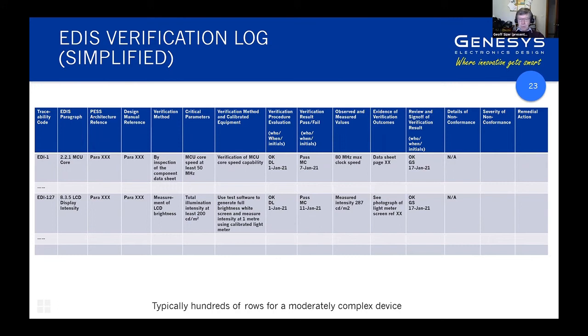So it's actually a virtuous cycle, not a vicious cycle, but it does give rise to additional work. I would say, as a rough guess, a third of your verification activities probably relate to 14971 requirements or derived requirements. So it has a big implication for requirements that are related to risk mitigation.